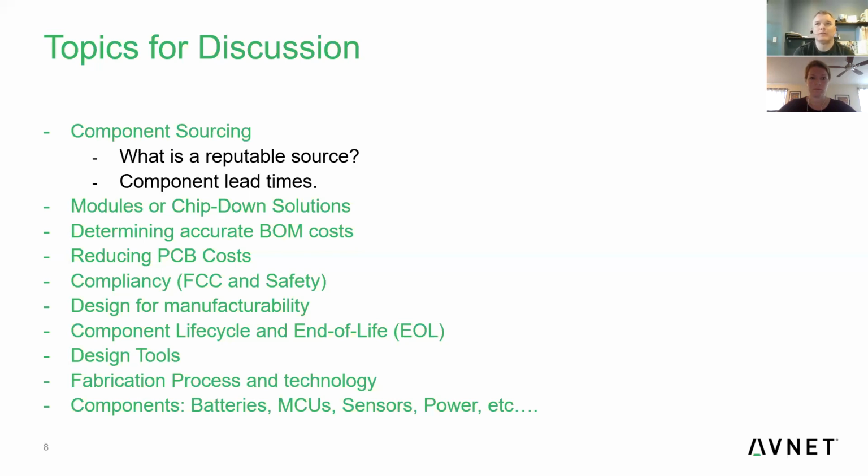I want to talk about component lead times a little bit. And particularly, I want to talk about them because I'm seeing some people get significantly impacted by these. Component lead times are basically the amount of time between when an official distributor places an order on a factory, and the time it takes for that product to actually get manufactured and end up in that distributor's warehouse.